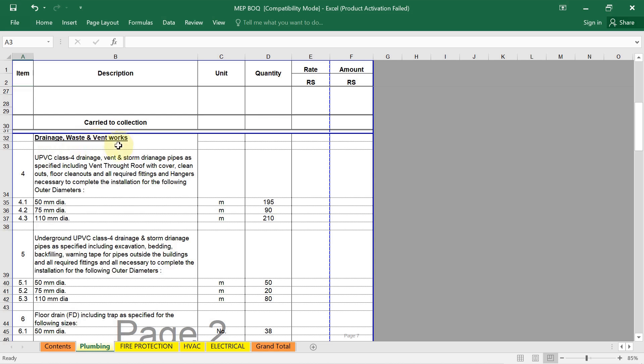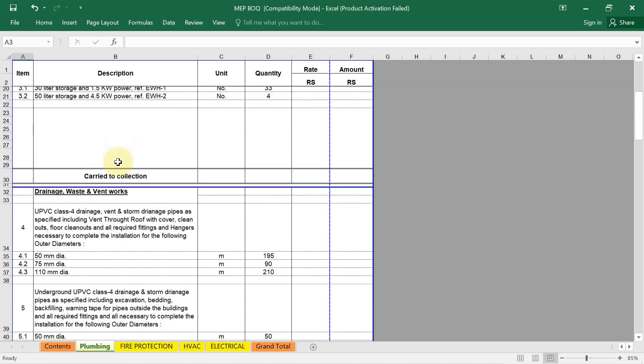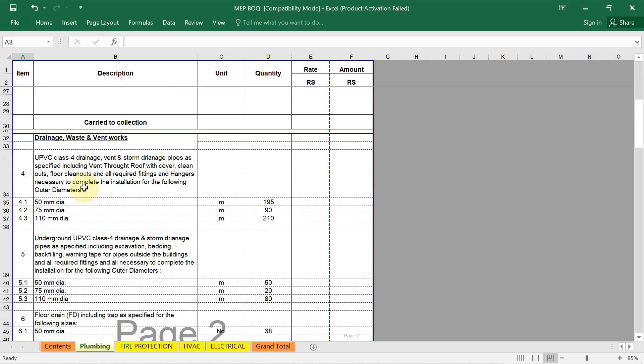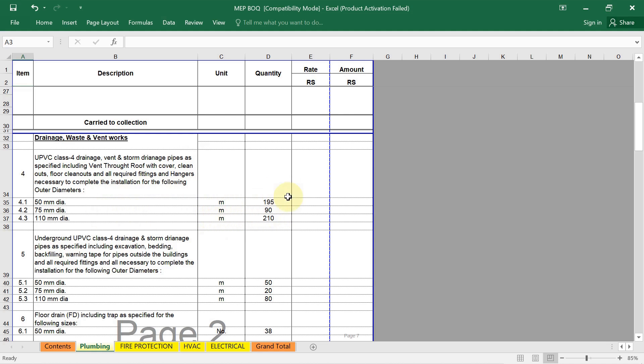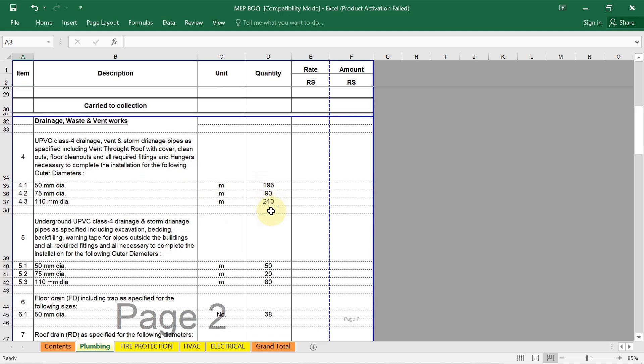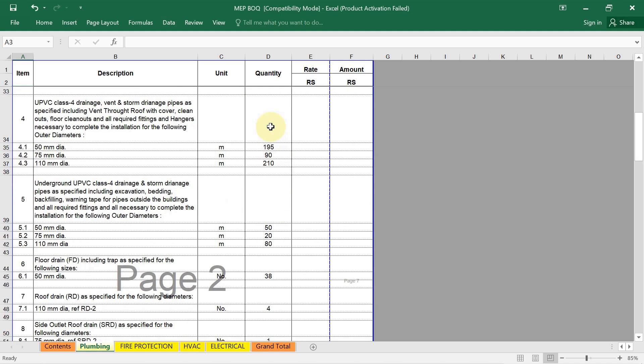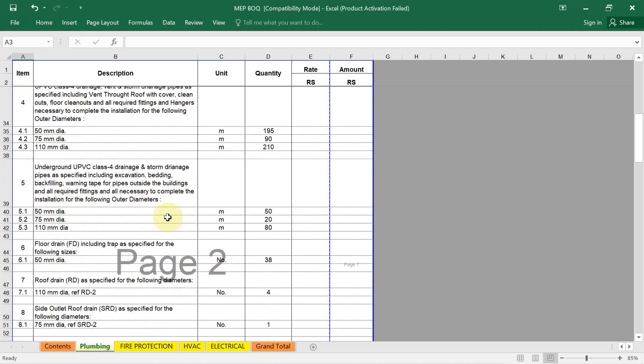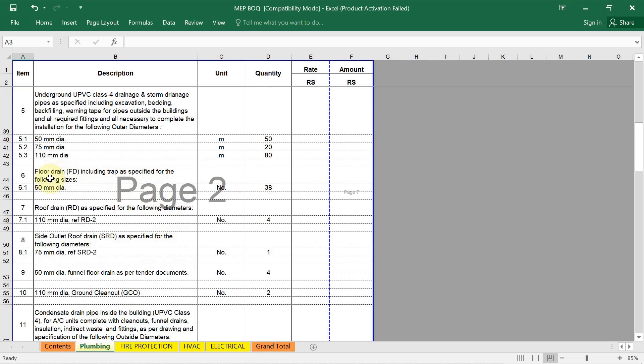Now this is our drainage waste and vent work. Water supply I have discussed. Now for drainage, the pipe which we are using for vent and storm drainage pipe. See UPC class 4 drainage vent. Here you have to write down the detailed description. Vent and storm drainage pipe, their detail. Unit of measurement is meter. Quantity you have to write down. How to calculate that, all I have discussed in detail. Same way underground UPC class 4 drainage and storm drainage pipe as specified including excavation, bedding, backfilling, warning tape for pipe outside the building.